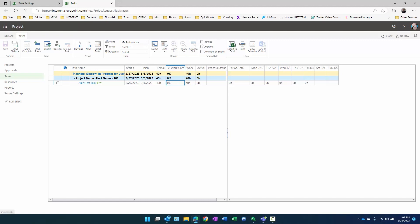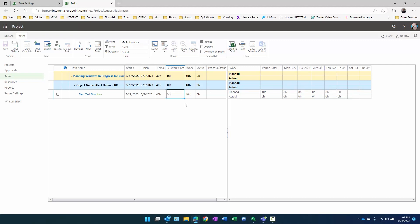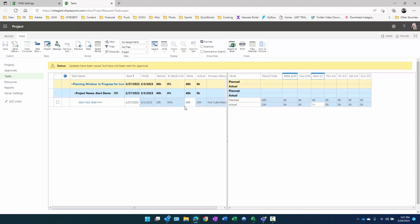If I click on this link, it's going to go to the task page in Project Web App where I can actually review this information. I can see here is the grid where I could look at the amount of time. If I had entered time, it would show up here. But since this is set up to select and enter percent complete, I would have to enter the time there. If I want to see what the plan time is, I could tick the checkbox. Oh okay, there's what's planned. The total period total is 40 hours planned, eight hours a day, five days. If I were to say, let's submit 50% on this, the tool is going to assume it starts on whatever the start date specified, that being the 27th. 50% would be 8, 16, 17, 18, 19, 20. So it should go 20% there. I'm going to click save: 16, 17, 18, 19, 20.